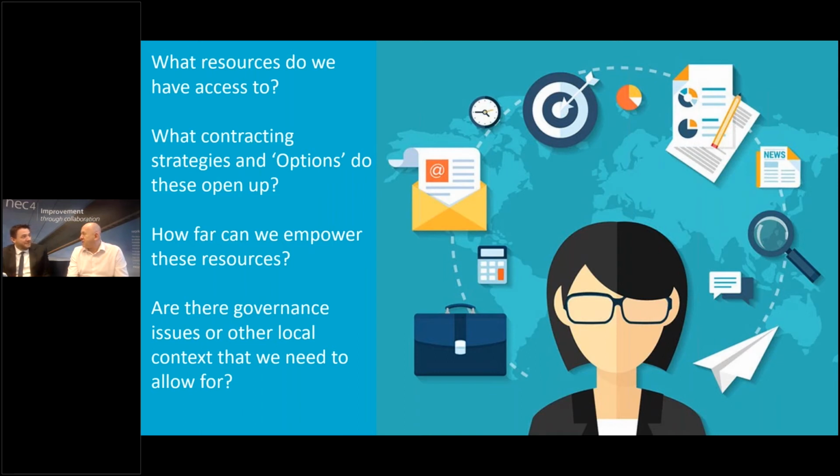Spreadsheets, pencils, and rubbers don't really cut it these days. I still see it, but it is beyond that. So we still need quantity surveyors, engineers, but also cost engineers and estimators. Estimators are crucial when you think about how compensation events are dealt with. They're effectively an impact assessment, the before and after the event. Who's best placed to do that? Got to be an estimator. Well, it's almost a mini tender, isn't it? I would say it's like a mini offer and acceptance, isn't it? The quotation.